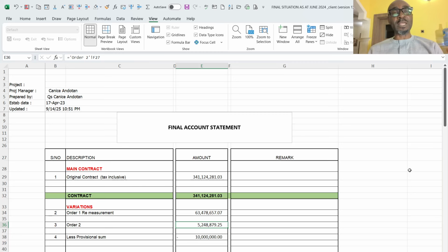The client is obligated to take an amount from that same figure to cater for the repairs of that job. And upon doing that, the expense has to be kept and deducted from the retention at the end of the contract. So the retention can be paid in full if there are no infractions, or if there are infractions, then some amount will be deducted from the total retention. So these are the factors that make up the final account.